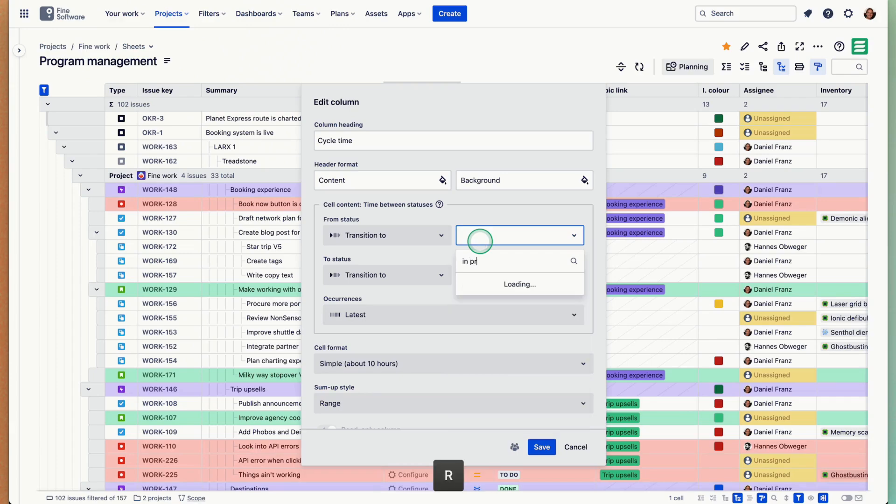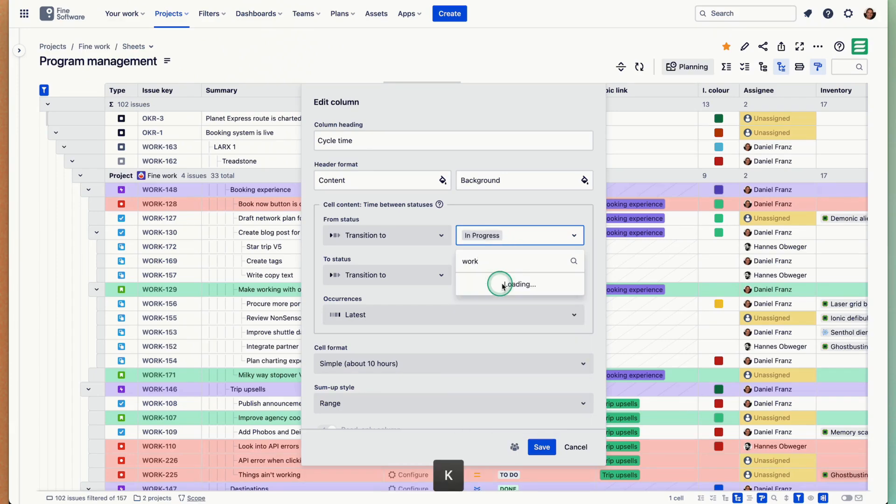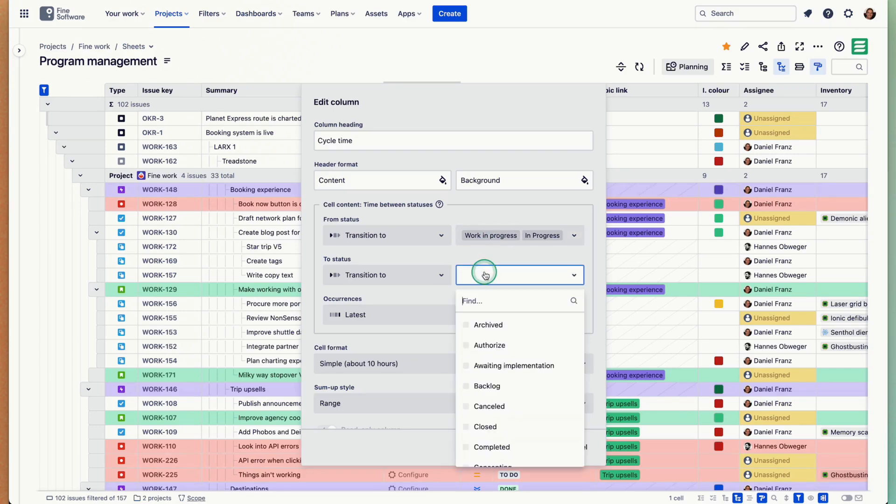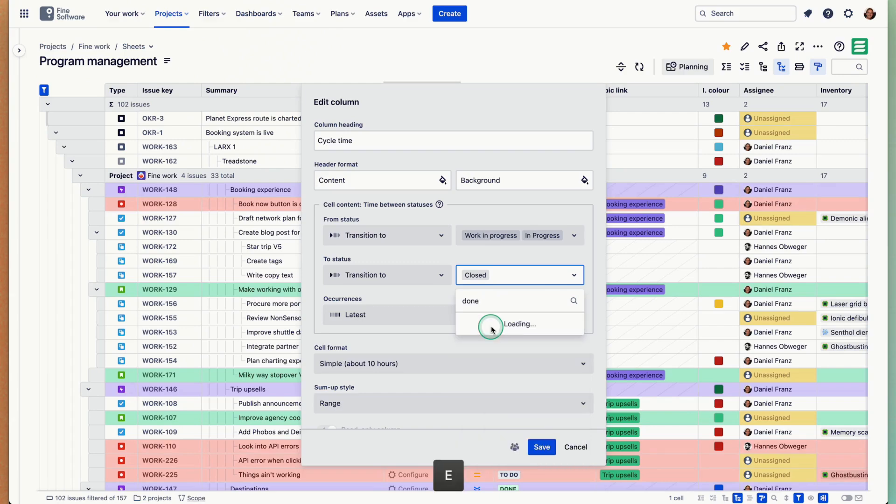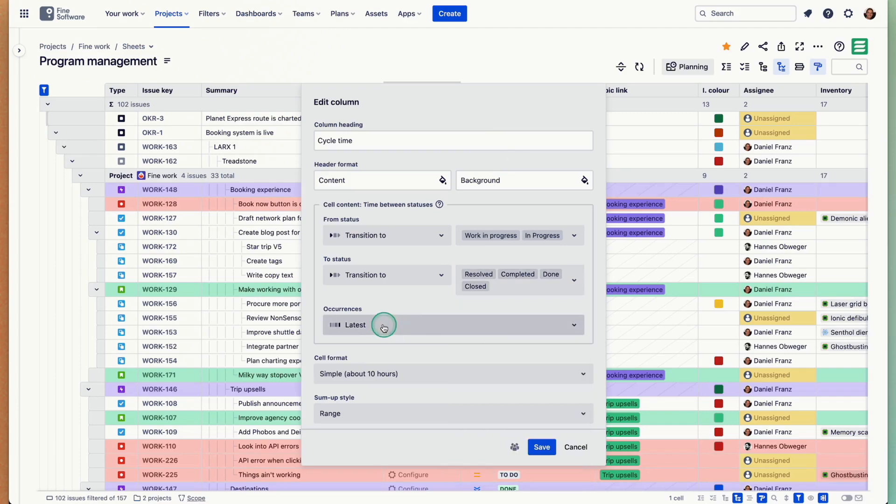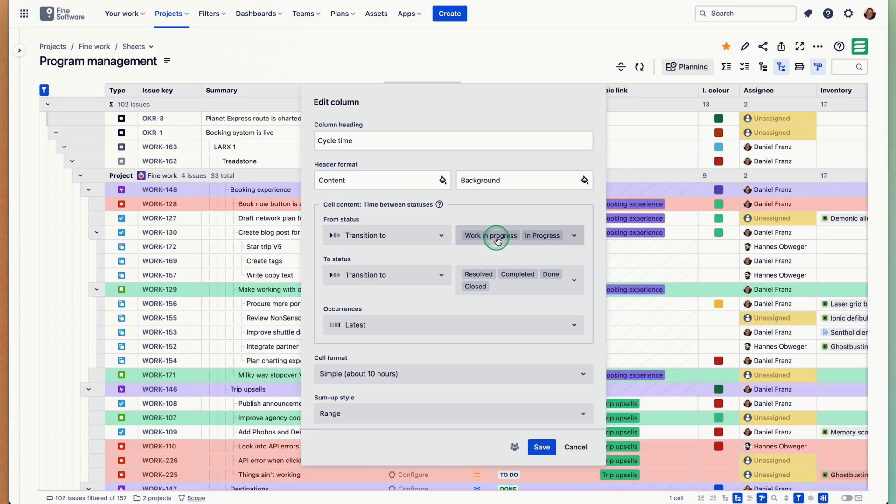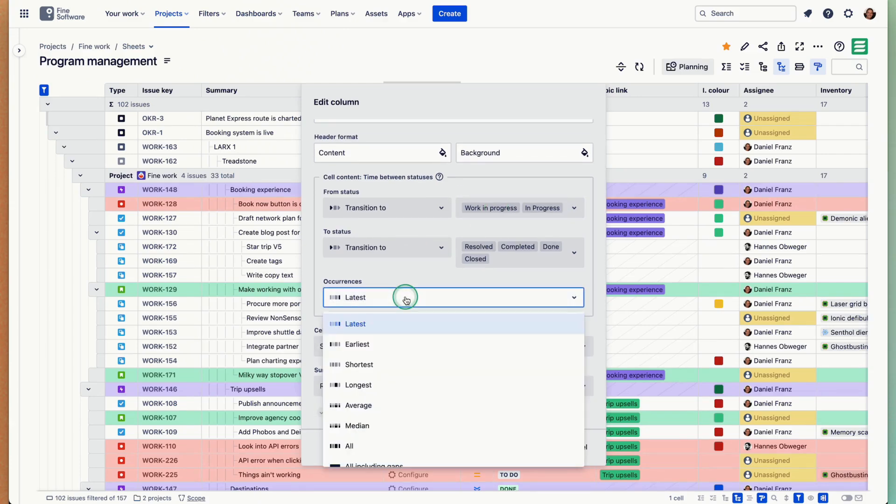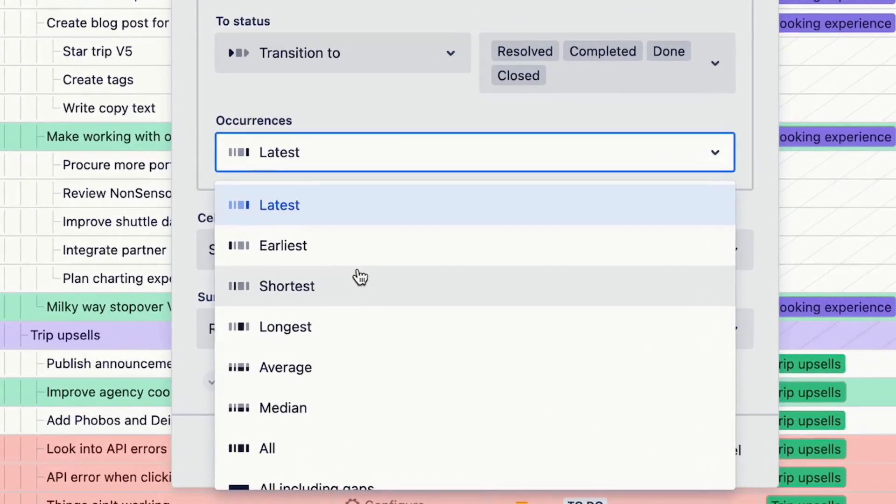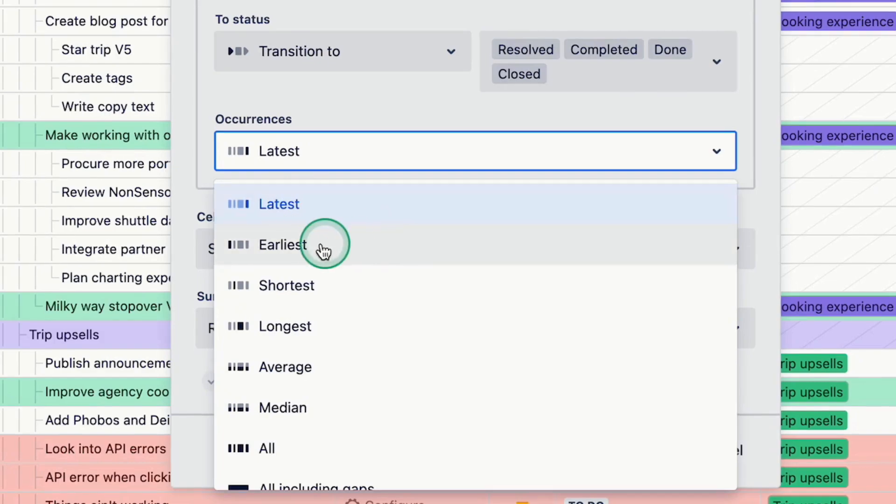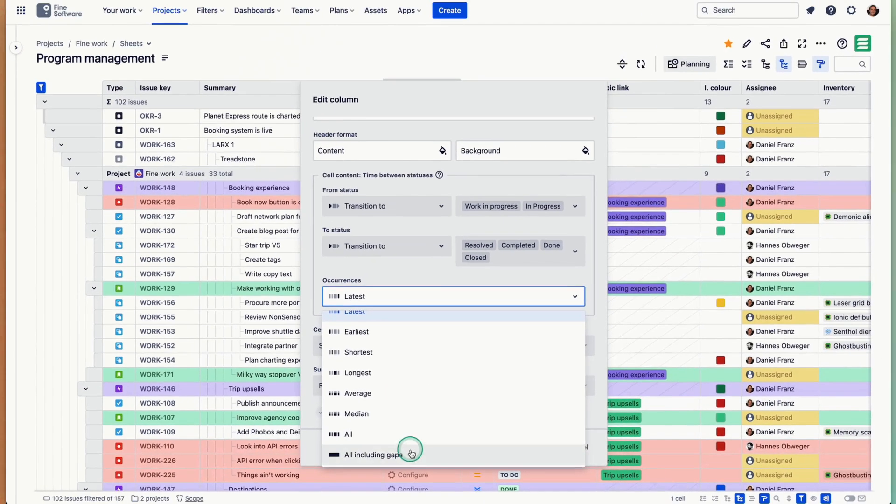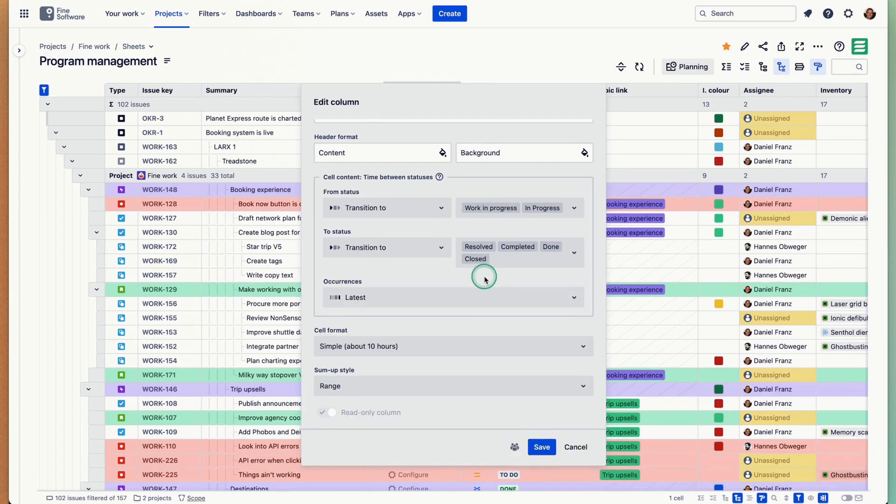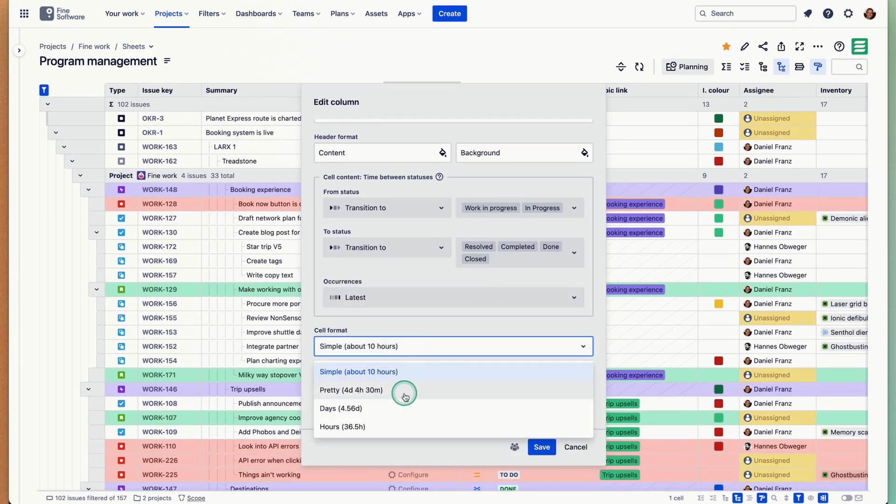I'll do that. And from in progress to let's say closed or done, completed, resolved, something like that. This cycle or this measurement can trigger multiple times in the life cycle of an issue, so this can occur multiple times. You can tell which ones you would like the measurement to entail. It could be the latest, could be the earliest, shortest, longest, an average, a median, all of them or all including gaps. I'll leave it at the latest. Then I can define the format of how this cell is meant to display this time. Let's make it in days.